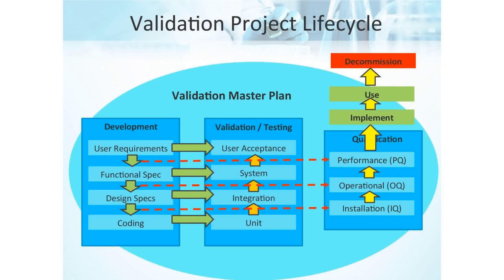That's right. Because when an auditor comes in, they're not going to audit, okay, I see how you have directions on how to install the system and how to test the system. I want to see the execution run of when you actually performed it as well. So that you have good directions on what needs to be done, and then as you executed it, that there were no failures. If there was a failure, you noted it as a deviation, and then it was properly corrected. And there are standards and rules of how to adhere to that.